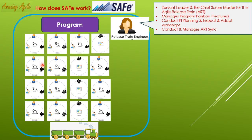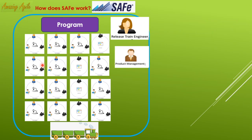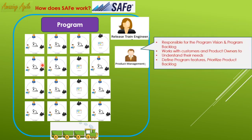The RTE manages the program Kanban board, handles PI Planning, and conducts Inspection and Adapt workshops. They also conduct and manage ART sync — managing the entire activity together with status updates. The next role is Product Management, who is the chief Product Owner. Their responsibilities include vision and program backlog preparation, working with customers and product owners to understand requirements, and defining program features and priorities for the program backlog.